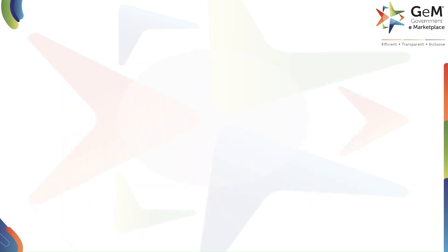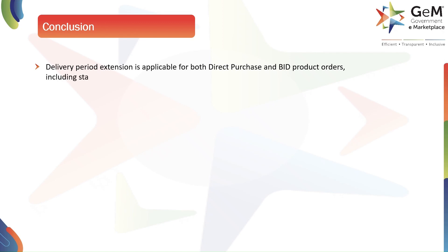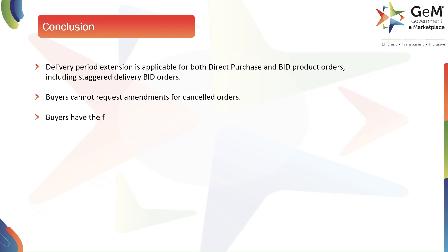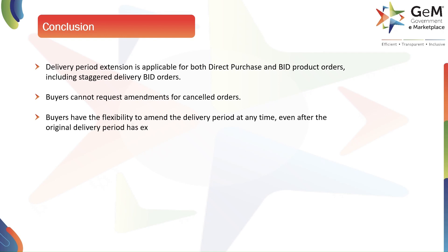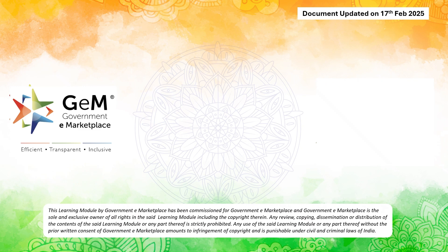To conclude: delivery period extension is applicable for both direct purchase and bid product orders, including staggered delivery bid orders. Buyers cannot request amendments for cancelled orders. Buyers have the flexibility to amend the delivery period at any time, even after the original delivery period has expired. Sellers cannot generate invoices once the delivery period has expired; they must request a delivery period extension to enable invoice generation. Thank you.